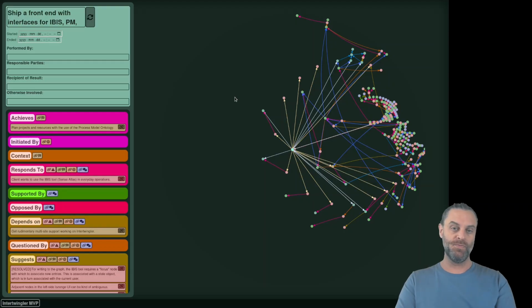So an issue graduates into a goal by saying, this person wants this thing to happen. And then it's only got a bit associated with it: is it satisfied or not? And of course you can go back to management consultants like Peter Drucker, saying a goal isn't a goal unless it has a budget attached to it and a deadline. Otherwise it's just a wish. Now, I looked at that and I said, you can't really attach a budget and a deadline to something unless you know how you're going to do it and what that's going to cost. Otherwise it's purely aspirational.